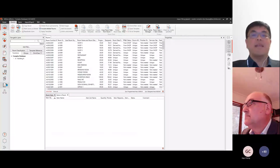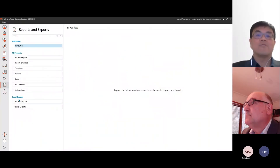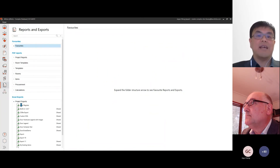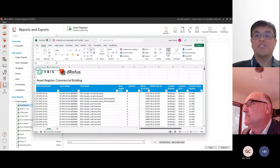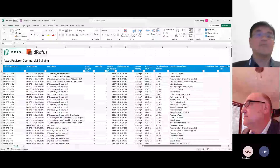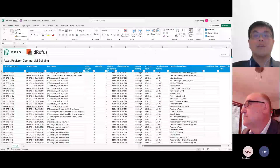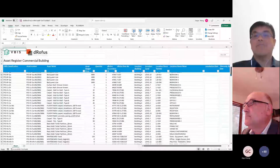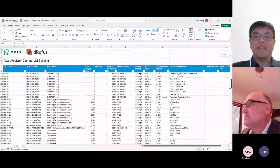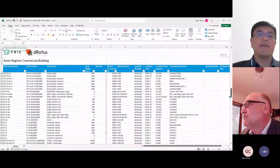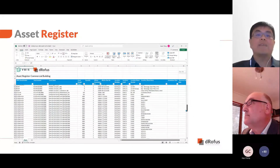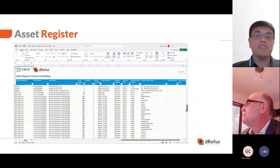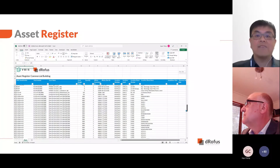If you are using Dorofus to manage your design and construction data, you can also use Dorofus to collect all your asset data at the end of a construction phase. You can export the data into an Excel format asset register. This example register shows the VBIS codes, the asset numbering incorporating the VBIS codes, the asset name, other identifiers and where it's located. Of course, there are many other fields of information that go into the asset register. This information can now be imported into your asset management software package, or you can use our API to access the data directly to enable lifecycle asset management.